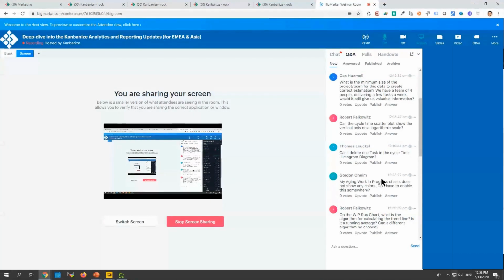So if you have a smaller team that delivers fewer work items, this is already embedded into the data set that we base the forecast on. So if you have lower throughput, we will project lower throughput in the future. If you have higher throughput, we will project higher throughput in the future. The size of the team does not matter.